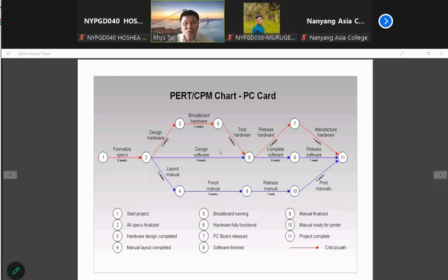Then you calculate the small job and the major job and combine together. At the end of the day, you will see how many days. Because a big project doesn't mean that everybody does one project. It can be broken up, depending on the sequence of process, into small projects so that you can monitor more closely the project timeline, budget, and the manpower requirement.